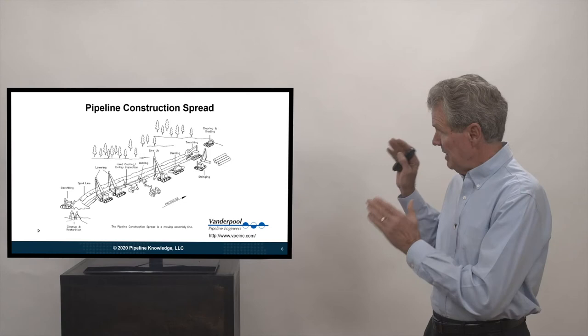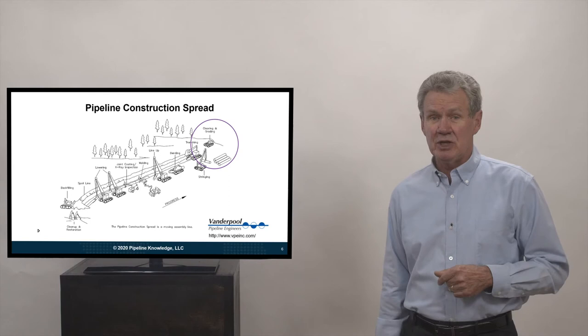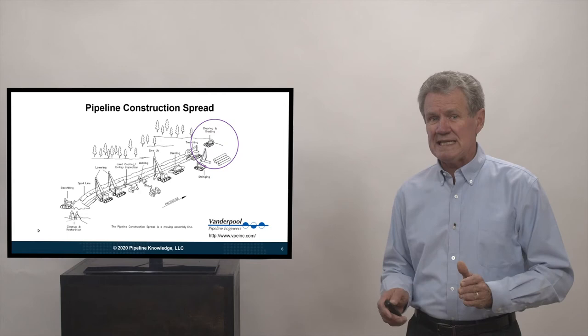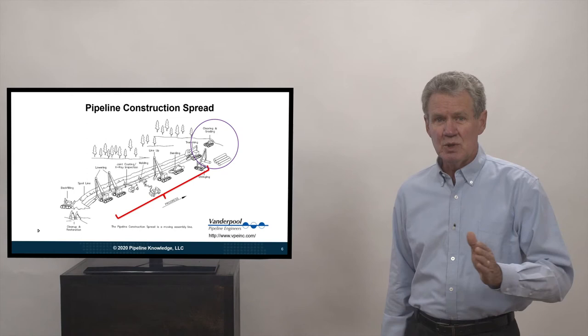So a pipeline construction spread. We start out at the beginning up here with the clearing crew. They are going through and clearing the right-of-way, building temporary roads, building temporary culverts, getting the right-of-way ready. So when this next crew, this main crew comes through, they can move through unimpeded.